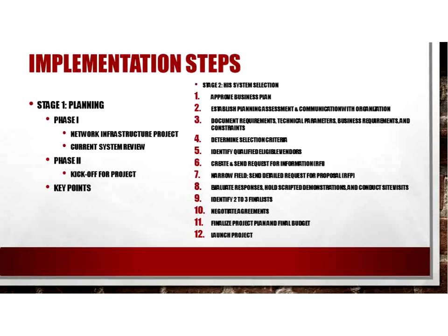It is going to concisely describe your healthcare organization, what your system requirements are, the timing that's required, the scope, and your expectations. You're going to send this to that list of possible software vendors that you have compiled. And with this list, it's going to be narrowed down through that request for information evaluation process.